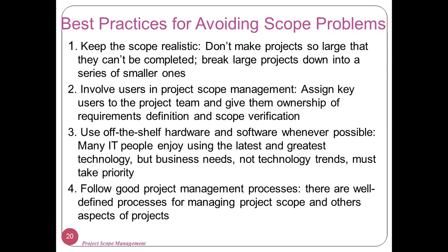So involve users in project scope management, that is, assign key users to the project team and give them ownership of requirement definition and scope verification. Why is that so?